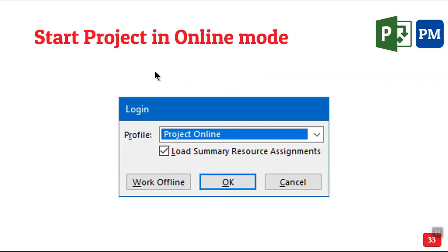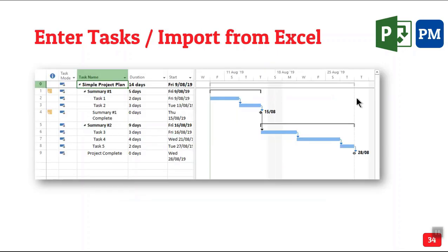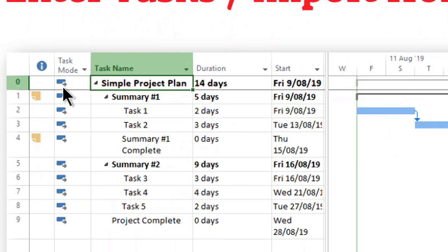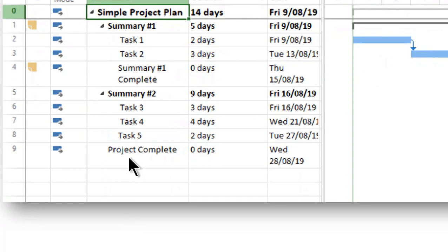So when you start Project, normally we work locally. This time we connect to Project Online. Who is doing this? Project manager. Where is it happening on Project desktop? Now I'm not going to tell you how to draw a Gantt chart. That's fairly simple. That's not the point. So I have some tasks here. But one thing you should always do is the last task is project complete and that's a milestone. Milestone has zero duration.